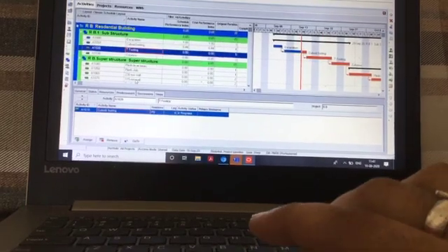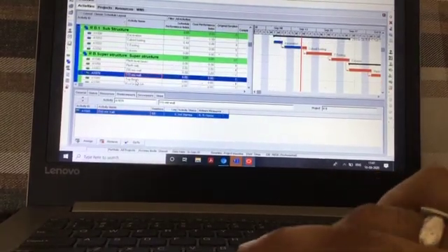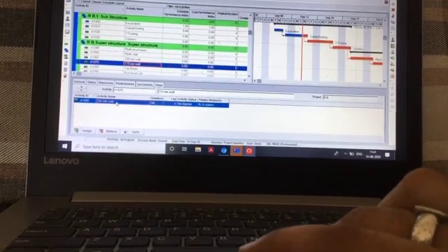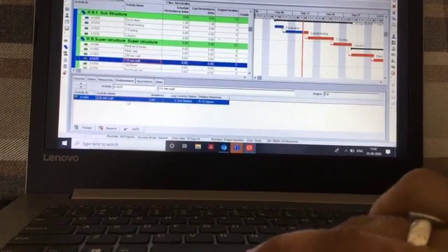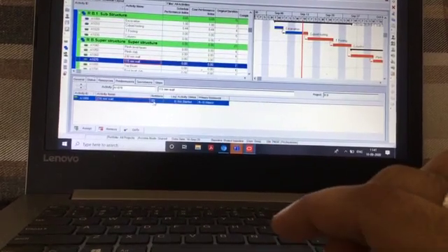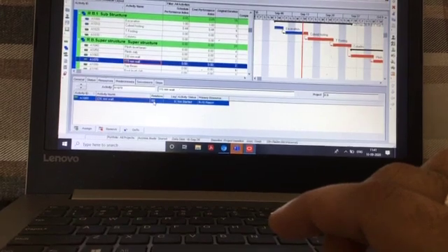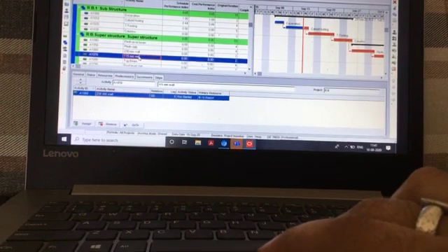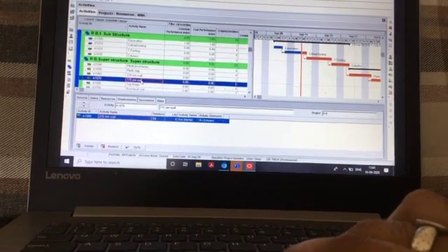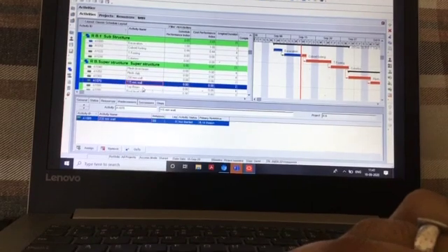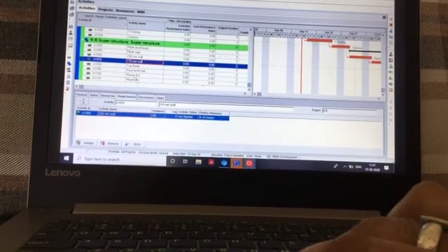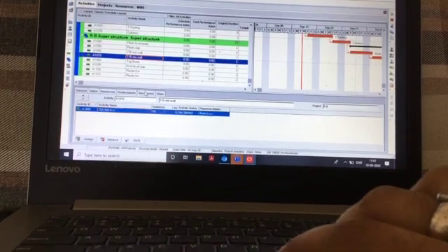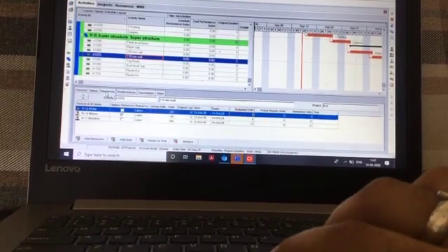Okay, so that takes me to another interesting thing. Look here, in this activity, the predecessor activity is 230 mm wall, but the relation is SS, start to start, which means simultaneously. We can start these activities simultaneously, right? It is not necessary to do them one after another. So let's see how we fare on this project. And successors, we have, okay, resources.